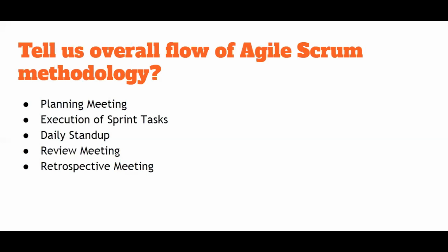So like this, we have to calculate how much work we are actually doing, how much time we have, and every hour what's the progress. So this is what is discussed here. Now once this discussion is done, the entire Scrum team meets for the planning meeting, the actual meeting. That was the pre-meeting. Now in this meeting, the final user story from the product backlog is chosen, and the story is moved to the sprint backlog. After the discussion, the user stories are picked from the backlog and kept into the sprint.